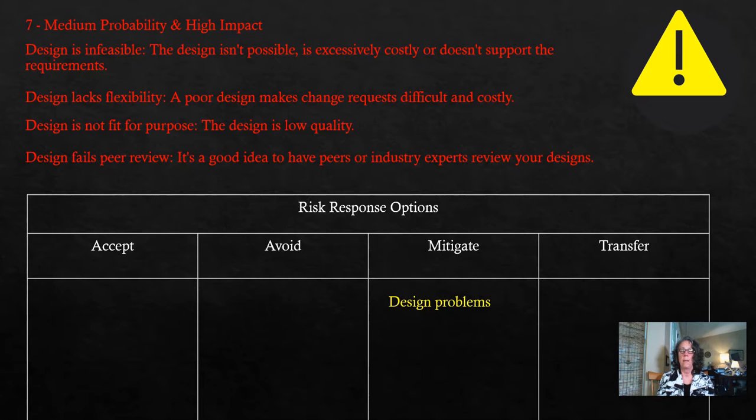And so it's possible that these issues could have been mitigated if there had been a small pilot project before the full-blown "let's replace the entire system." If a small area of functionality had been identified to segment out, and then they had actually made the necessary data structure changes, loaded some of the data from the existing system into there, and enhanced a little bit of the functionality, just to pilot on a small scale whether this was going to work or not, that could have demonstrated the feasibility of it.